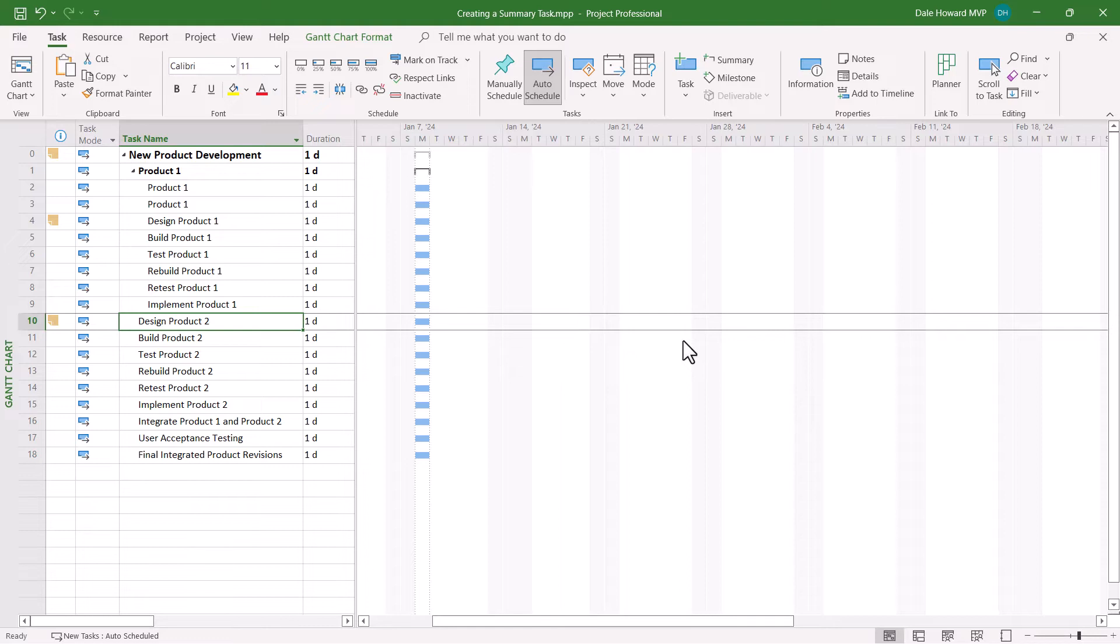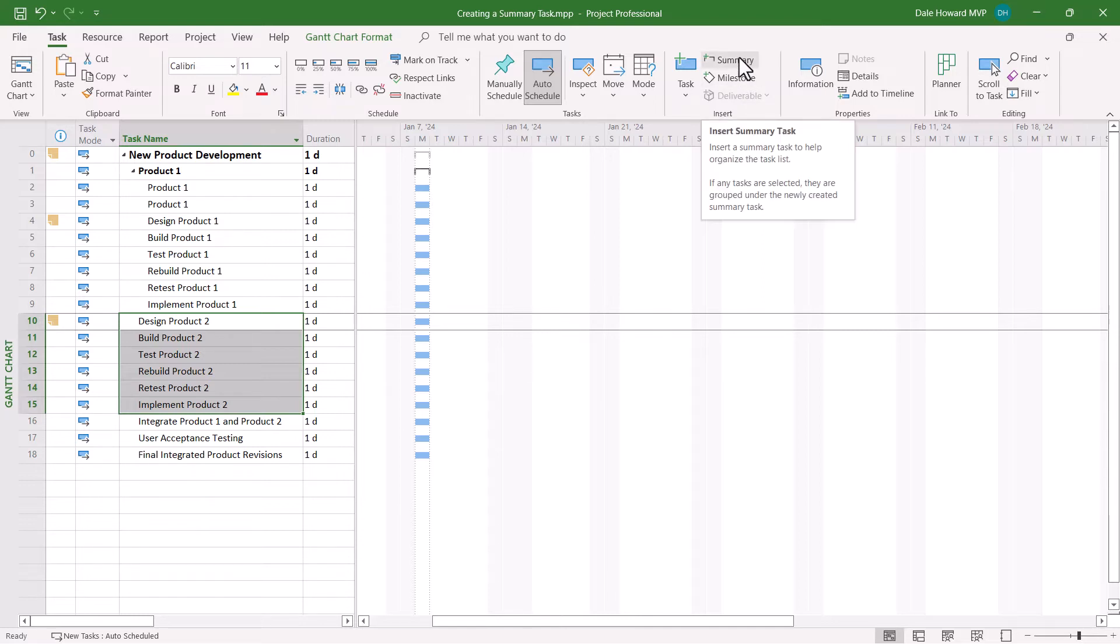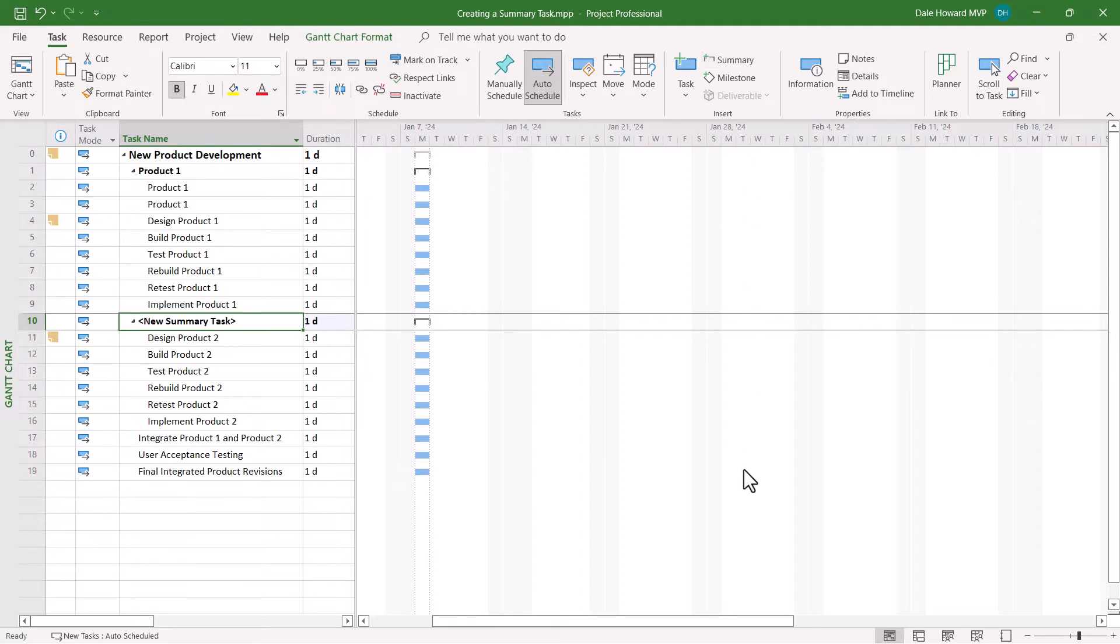The second method for creating a new summary task is very cool. I really like this feature. To use it, what you need to do is to pre-select the tasks that you want to become subtasks of the new summary section. And then over in the insert section of the task ribbon, click the insert summary task button.